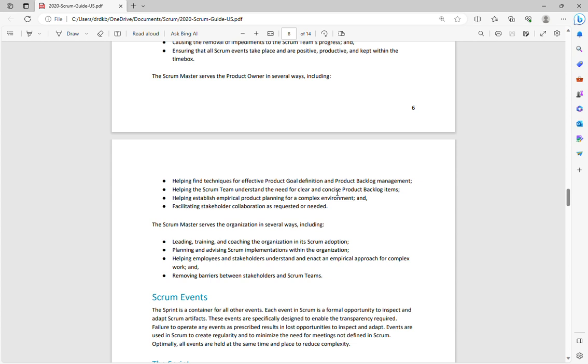So a Scrum Master can ask such questions during the sprint planning, like have you considered the testing time required during the estimation, and then also have you considered the definition of done criteria, as we have already discussed, like if the performance testing has been considered, if there are any external dependencies related to the story that have been considered, if the documentation related things have been considered.